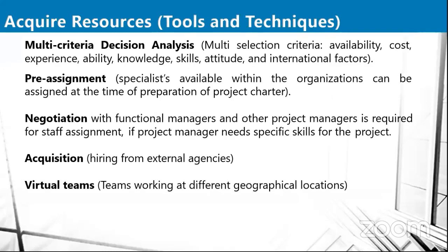Of course, we talked about tools and techniques, multi-criteria decision analysis. When you are getting a team member, you're employing a team member, you have to consider the ability of that team member. Is he going to be able to carry out that project? You have to consider that. You have to consider the cost, experience. Are you going to be able to pay that team member you're going to employ? Then you talk about the knowledge. Does he have the required knowledge, the required skill, the right attitude on the job? And of course, you may have some other international factors. So that's what we mean by multi-criteria decision analysis. And you have to consider pre-assignments.